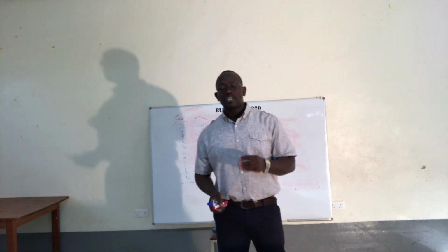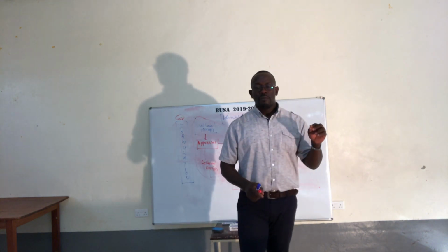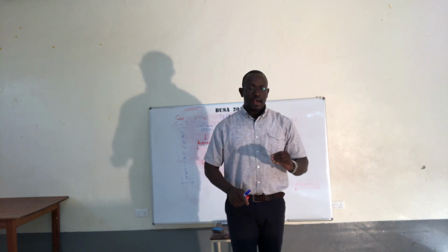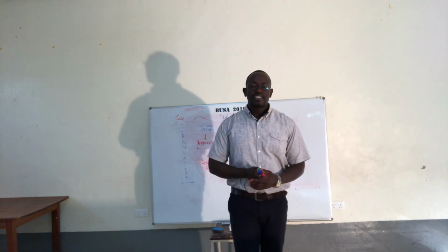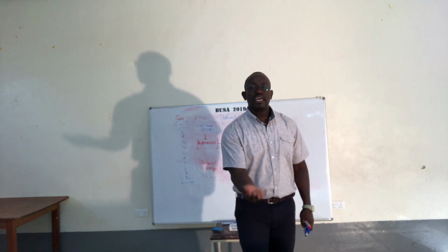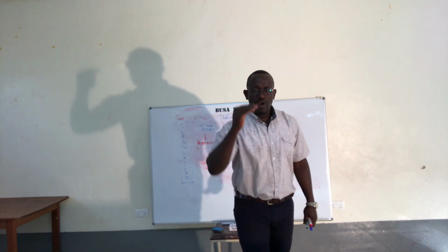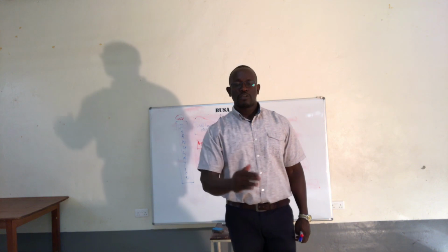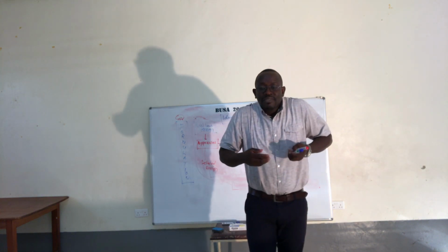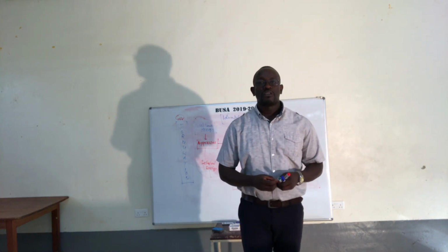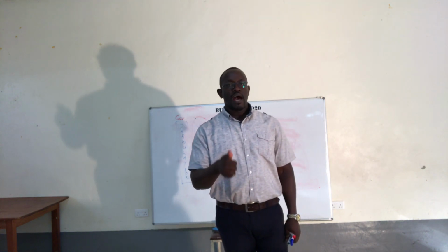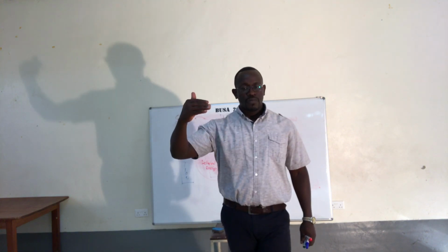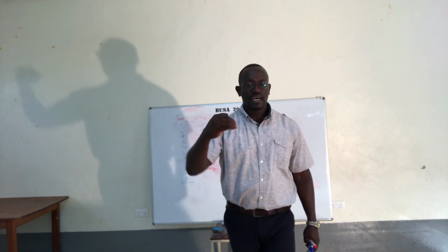The only thing that will make you different from another person who has just studied this course is that you stand elevated: whenever you evaluate the project, you use the same evaluation report data to start a new project. The evaluation report gives you the next needs assessment.